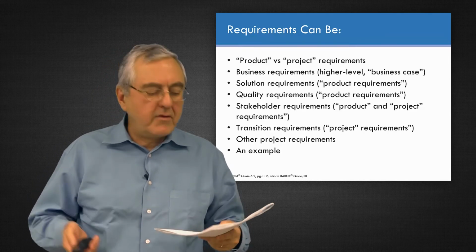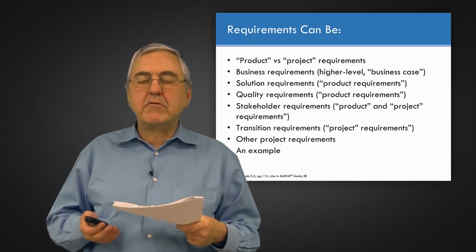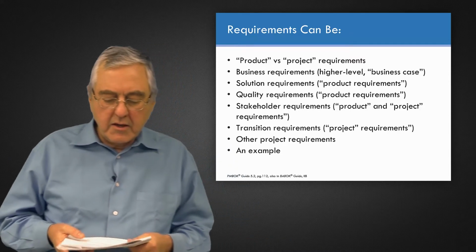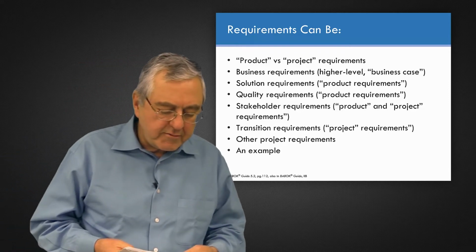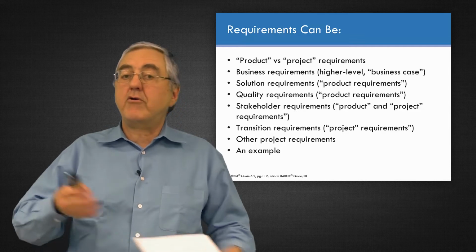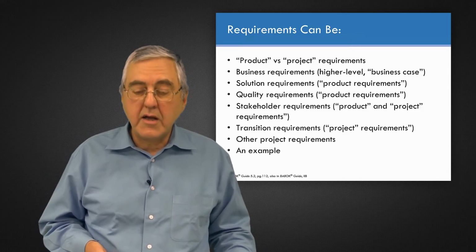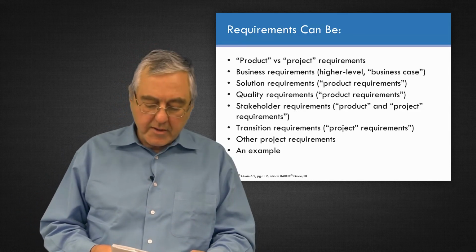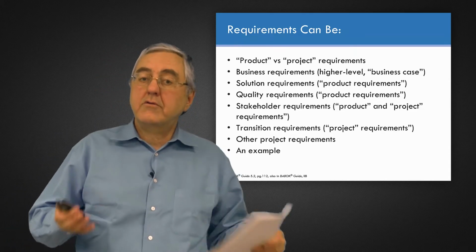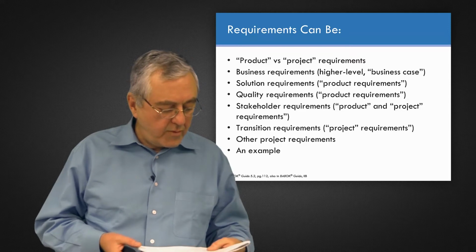Well, there's business requirements. These are higher level business needs. They're really related to the business case. Does it make sense for me to go into this project? So a business requirement would be that the investment in the project must be within a certain affordability limit that my wife and I can afford, and there'd be a business requirement that the inn is going to earn a sufficient financial return to make that investment worthwhile.